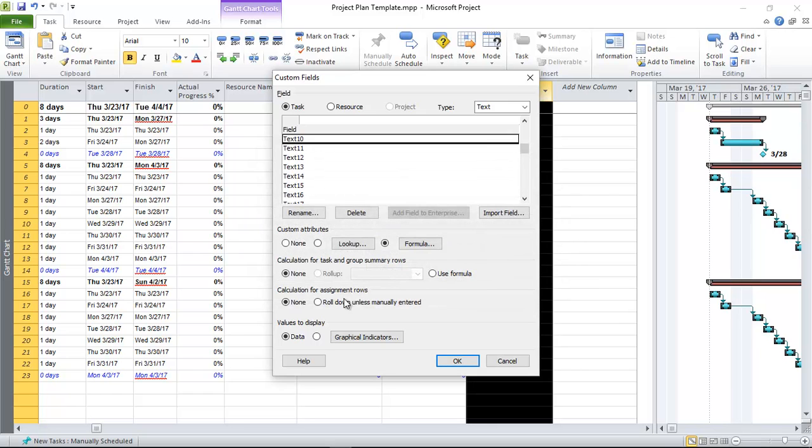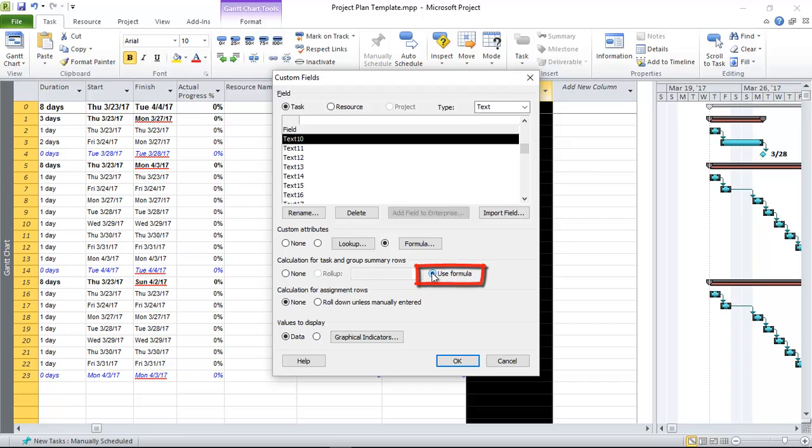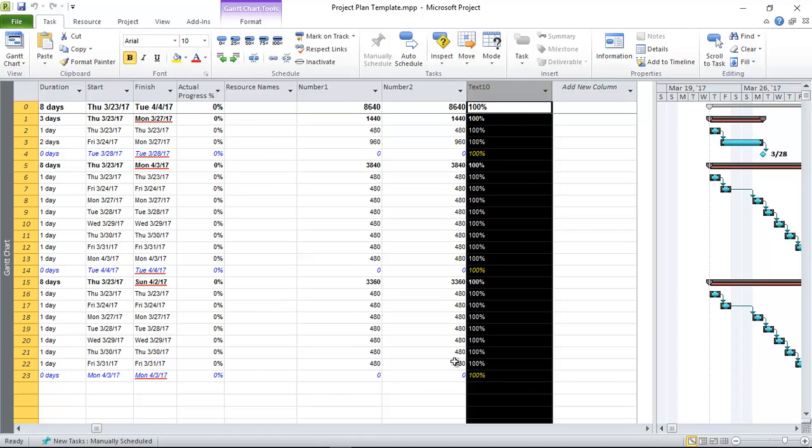And then here where it says roll up, you'll see it's now disabled, so I'm going to say use formula and click okay. So you'll see now that it's implemented the planned progress calculation.